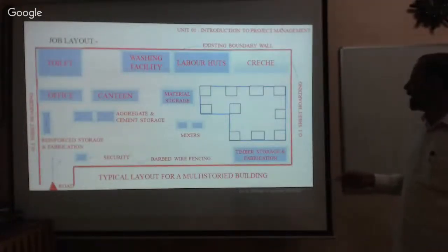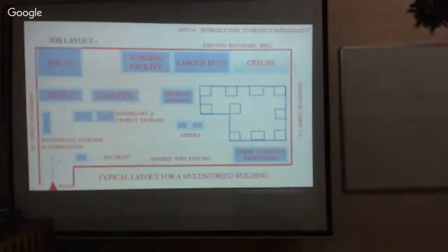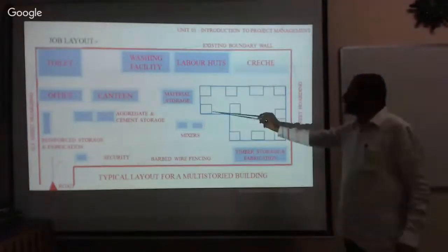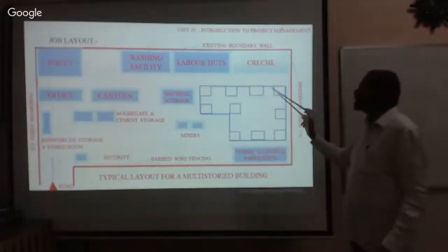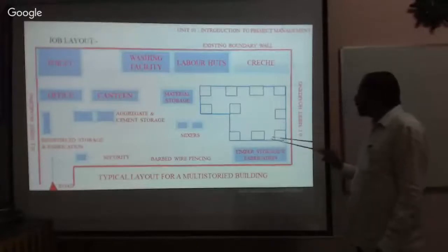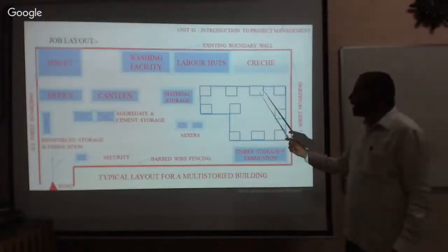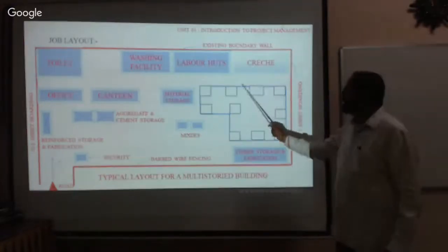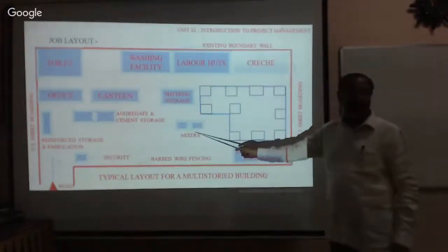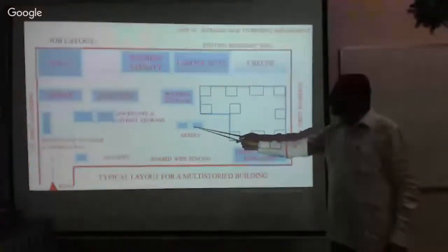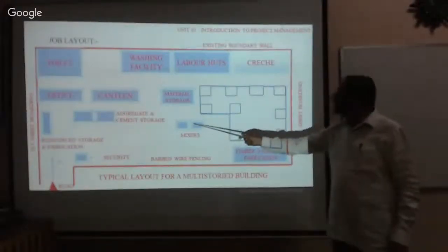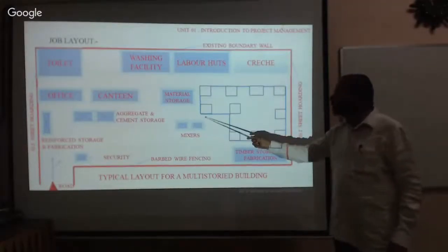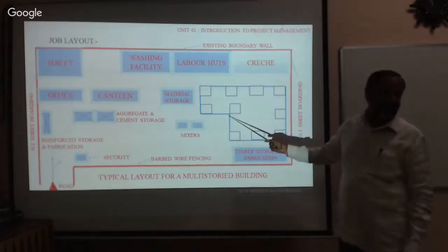Let us assume that this is the construction of a building, a high-rise building, or maybe the project site. This is where we are building it. Please understand, the material must be available around this. We have established the mixer here, isn't it? That is the concrete mixer. From here we can transport the concrete to the location, a near place, isn't it?